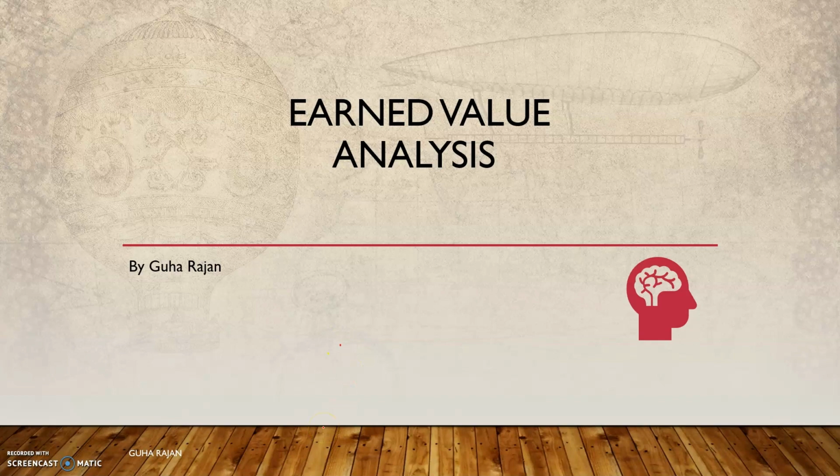Earned value analysis. This is quite an important topic. That is, once you have baselined the project for your schedule and your cost, then as you start executing the project, you need to do earned value analysis at a periodic point of time or whenever required, so that you can check whether the project is on track, that is on schedule as planned, or whether it is lagging on the schedule or ahead of schedule, and whether there is a cost overrun or whether it is on track of the budget. All this can be done through earned value analysis.